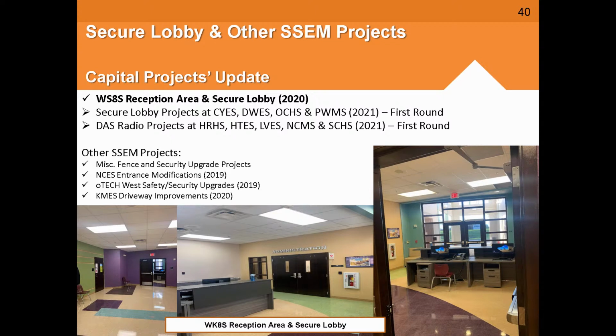So again, we're working seamlessly with them and our code officials as well, because they also see this as a high priority. For example, when we just recently completed the Poinciana Business Academy, that school had some serious deficiencies. So we actually corrected those deficiencies in that project. Even though the building that we added was fine, the rest of the campus had issues, and whenever you build something, you can negatively affect the reception of these 800 megahertz radio systems at the existing campus. And that's exactly what happened in this case. It got worse when we built the new building. So we went and fixed that problem as part of our project. And it just so happens that we used Radio One to accomplish that feat there.